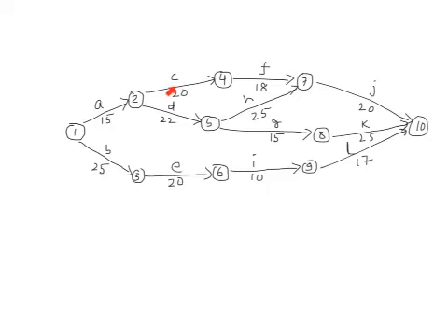You can see that C starts from node 2 where A is ending. So for C, A is immediate predecessor. For D, A is immediate predecessor. Similarly for J, F and H are immediate predecessor. So we can see from this diagram what are the immediate predecessors, and we can compare it with the work breakdown structure table, and if it is matching means our network diagram is correct.